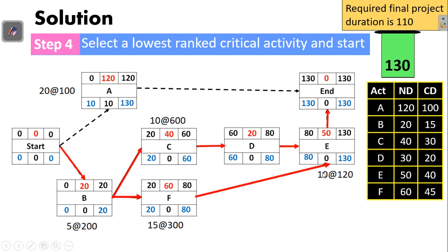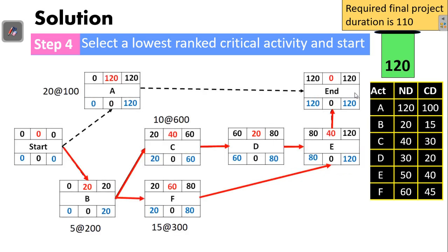So we are going to take those 10 days, and again you need to recompute, because it is going to affect the duration of this activity, because we have reduced it by 10 from the normal. Now it is going to be 40. It is going to affect the earliest finish time and the other information in the other activities. So recomputing it, we are going to end up with this. This table here has a completion time of 120 days. You can see that we didn't distort our critical paths. So our critical paths are still critical.